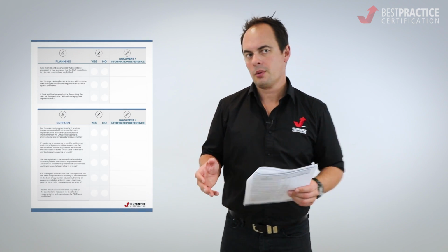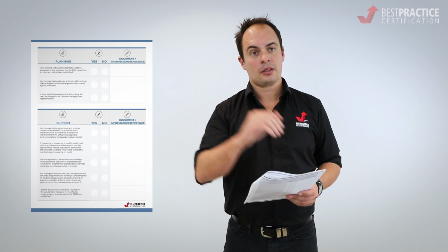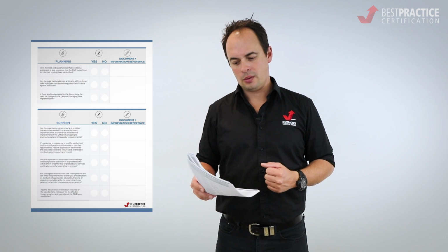Now, this is the first time where we start to talk in more detail about controls. We identify the risks, we assess the priorities, we talk about controls, the things that we're going to do to prevent those issues coming to fruition. So in that risk register, we can start to nominate the controls, and then obviously we can be going through the organisation, ensuring that we're doing those things on a regular basis to prevent those risks or threats coming to fruition, or ensuring that we execute on the opportunities that we've got.